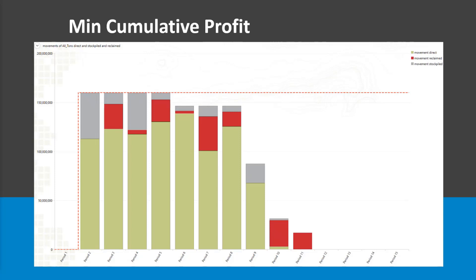How can it shift operating costs, and potentially buy more capital to shrink the mine life back down, get the NPV up, but not go below my $750 million available loan? The solution it came up with: in year one, it decided not to mine any material and not to do any pre-stripping, going straight to 160 million tons in year two. The problem is I don't have any ore available at the start of year two for my mill and leach. So I told Scheduler: I need you to pre-strip at least 50 million tons in the first year. I got to that 50 million number by looking at results and where the ore was in my early phases.